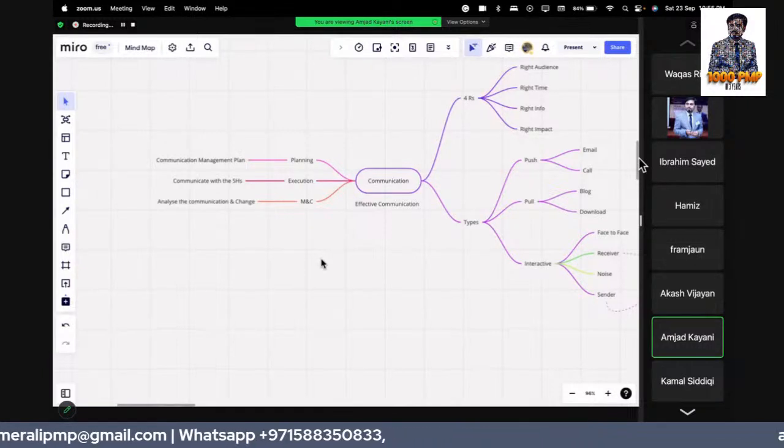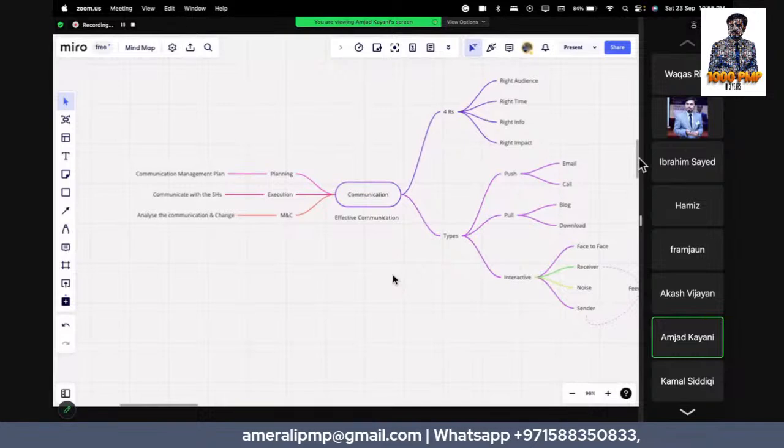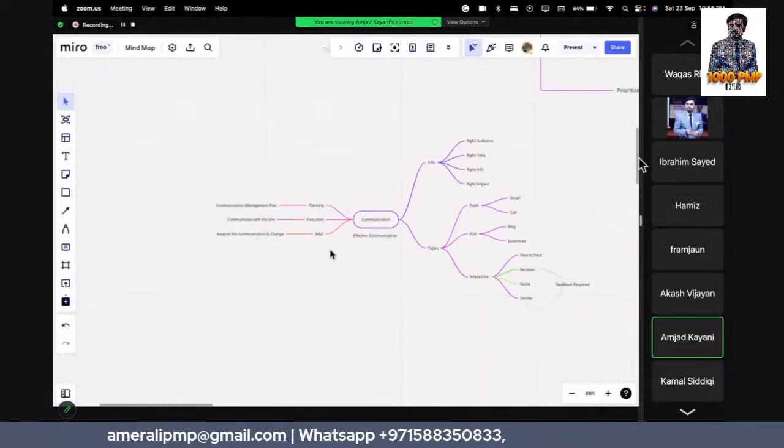If it's correct and it's better, effective communication, then we go with it. Otherwise, we change it and we update the communication management plan with the help of a CR.